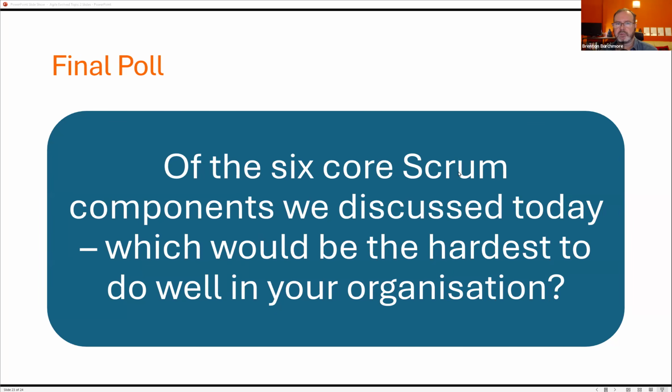And sometimes the technical requirement of iteration 0 or sprint 0 is what decides what needs to be done and refined first. We've got to figure out these big strategic questions, because if we figure them out later, we could be in a lot of trouble. So we're going to force them into our first 3 sprints, and that might shape what goes on initially. But what happens after that may not be worked out yet, but you never want to be refining your stories literally the day before you have your sprint meeting. You want to always try and be at least 1 full sprint workload ahead or more on your refined user stories.